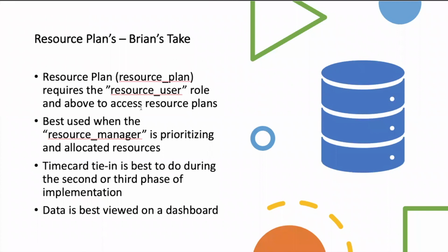So real quick, again, resource plan is not part of the PPM area. You need to have a specific role to get into the resource plans, resource user or resource manager. So not all project managers are resource managers, obviously. So just understand that when you submit a resource plan, you need to have somebody with the resource user role or anything to manage that. Again, it's best when the resource manager is the one prioritizing and allocating resources, so you don't have people getting overbooked. Time card tie-in, again, best to do on the separate or third phase of the implementation.